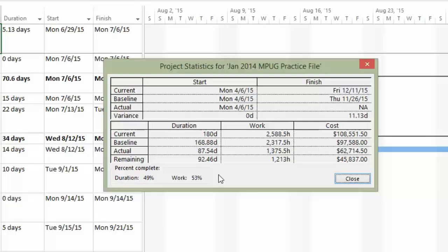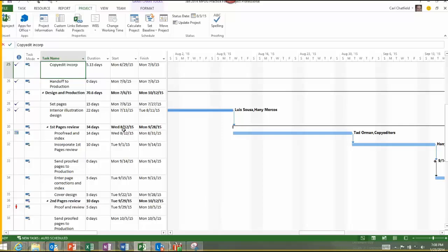Now, it all depends on the distribution pattern of work throughout the duration of your project. This project happens to have a fairly typical equal distribution or bell curve distribution of work, but many projects by their nature are heavily front-loaded or back-loaded or have some other pattern of work distribution. And you need to understand that to really evaluate, hey, should these two values be that close together or not? So I'm going to begin with some activities.